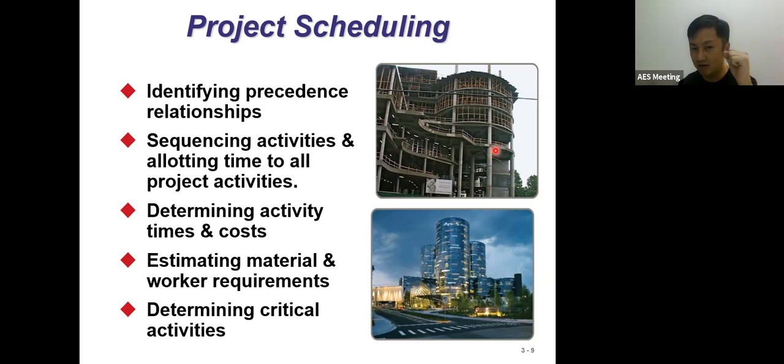Quite obviously, based on the example I provide, in any construction like in the pictures here, we do the piling first. The piling supports the building based on the land base. Once the piling is ready, only then are we eligible to build the rooftop.